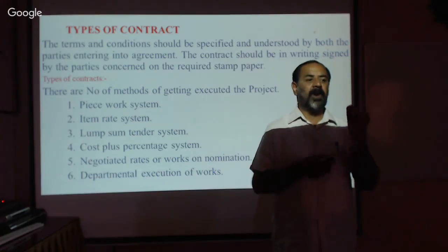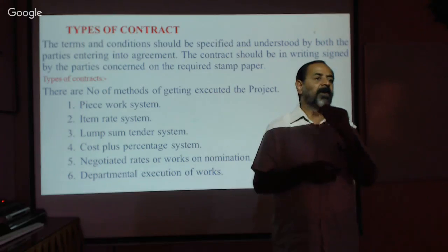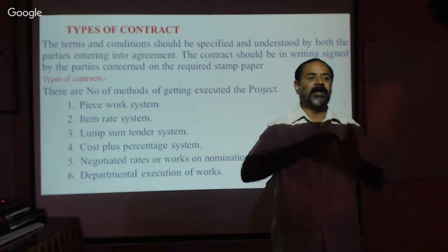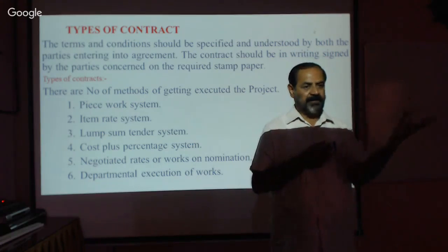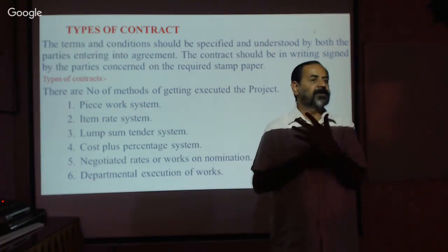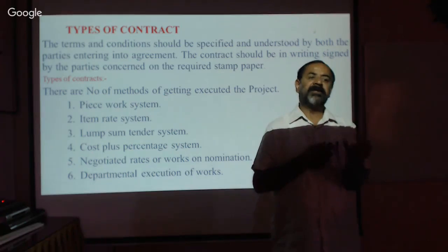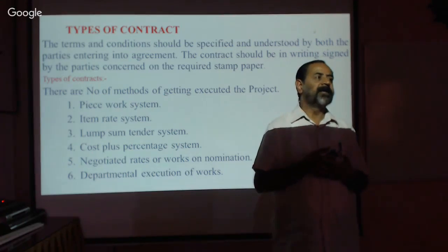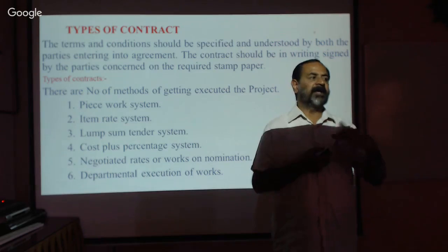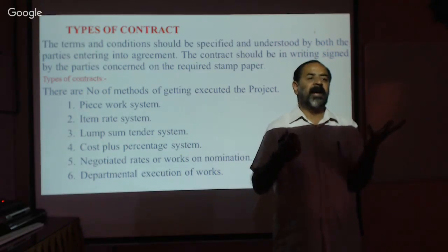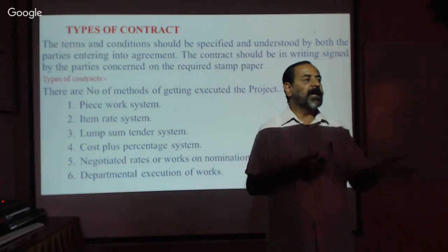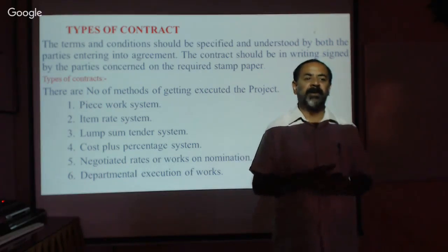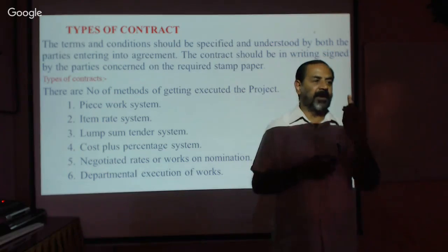What are the disadvantages we have? Normally, if you give the lump sum contract, sometimes depending upon the soil condition, the foundation may change. Then that fellow will stop the job and ask you to make the drawing again, you made the foundation, the structure is ready, and you have to make it again. Then conflict, number one, conflict.